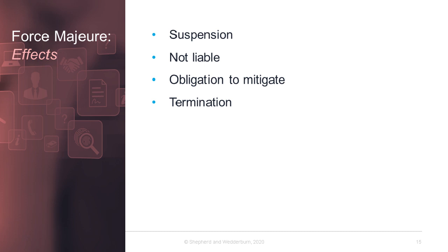Whilst force majeure provisions are helpful tools in extreme circumstances, they can be very onerous for the affected party to rely on. A final quick point to note is in relation to force majeure provisions contained in standard business terms. These will be subject to the Unfair Contract Terms Act 1977, and so to be enforceable, such terms would need to satisfy the reasonableness test under UCTA.